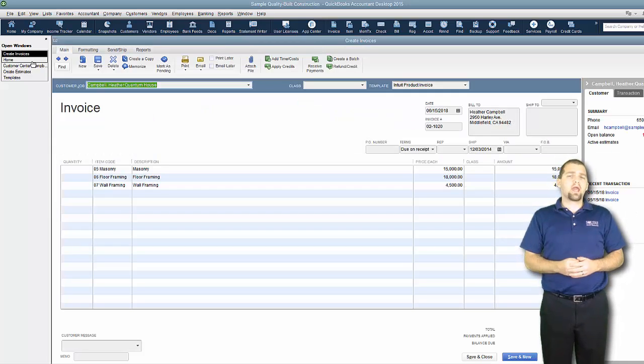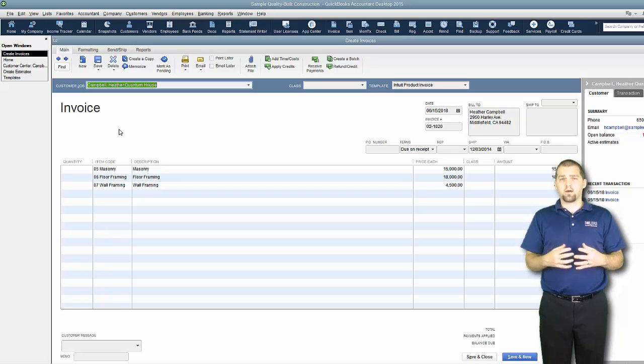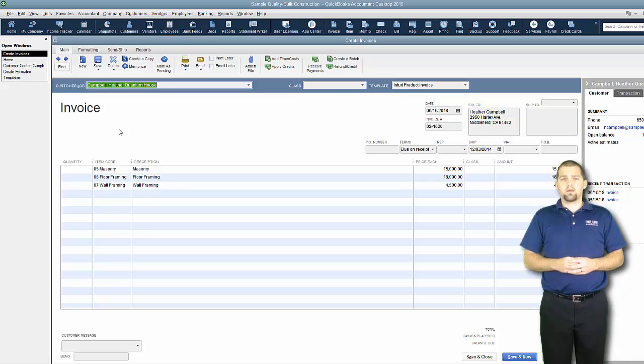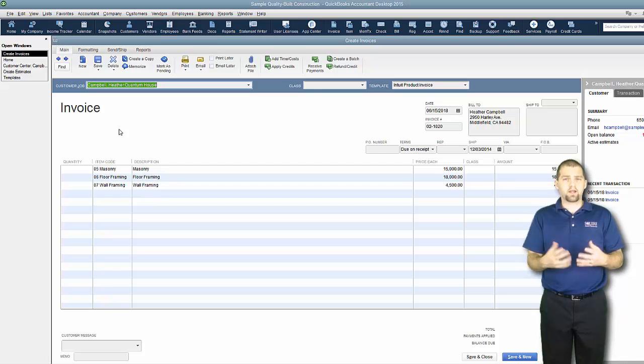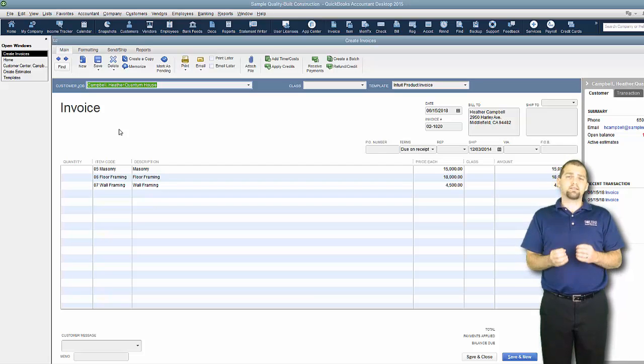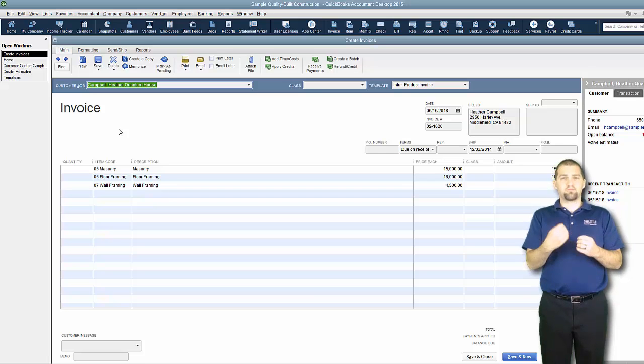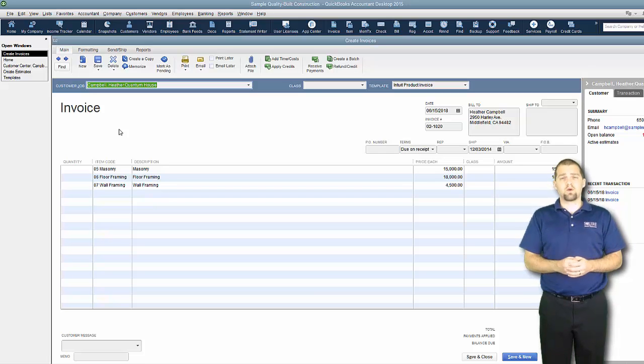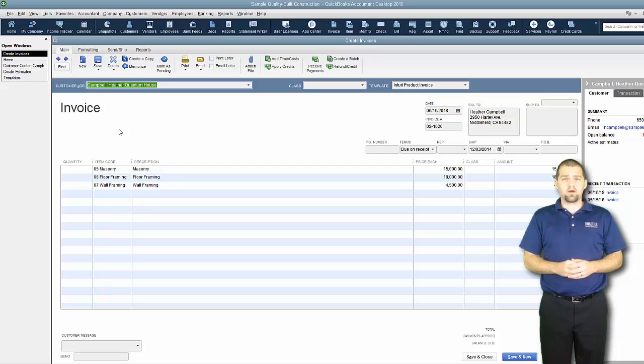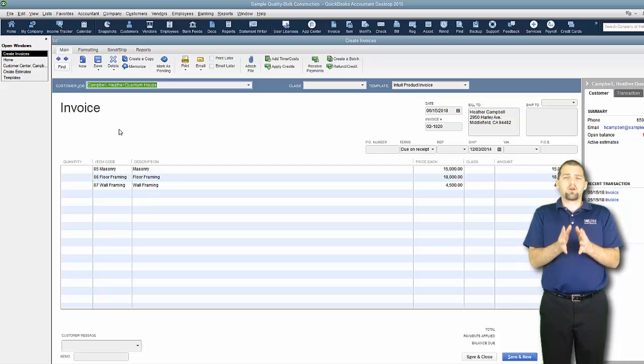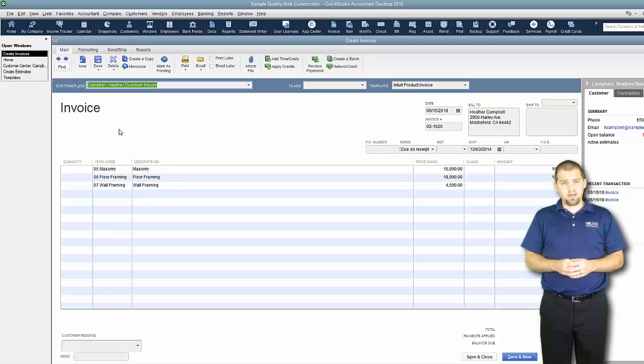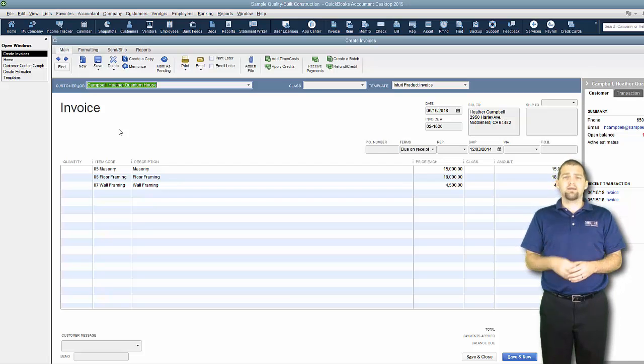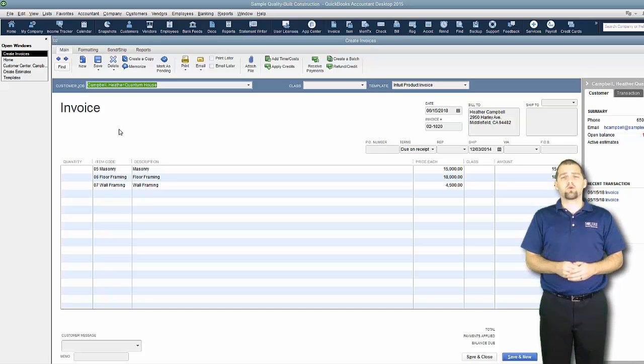So what you're looking at right here is a typical invoice in QuickBooks Desktop Edition. As you can see there isn't a lot of features that a typical contractor is going to want to see such as the amount that was billed last time, the amount that's billed in the invoice right now and what is still remaining to be billed, kind of a percentage complete. Those are very foundational principles for billing in the contractor world. And stock, that's not available in most of your QuickBooks editions. So that's where Quantum is going to come in.